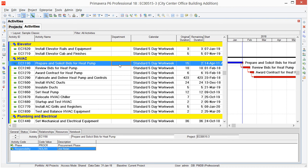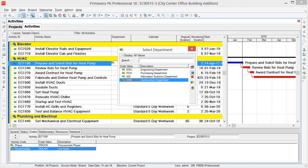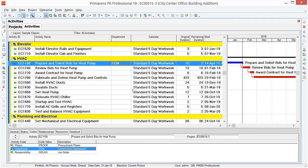Directly in that column, you can select into the Source field, that's the one with the orange frame around it, and in that field you'll be able to select and make an assignment for that value. So here we've got the Construction Department, and now we've assigned that value to our activity here in the HVAC grouping band. So that already is faster than using the Activity Codes Detail tab down below, but it's not as efficient as Fill Down.